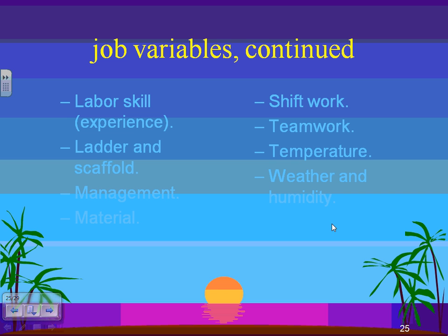That's based on that book, up to 30%. The third shift is at night. Kids are sleeping, I guess, and you don't have a whole lot of things to see. People are sleeping. You can go up to 20%. Anyway, these are all suggestions, guys. You don't have to take them by any means. But what this helps you understand is how to manage your labor. And sometimes you really don't have control over whom to send there if they're not your employees.